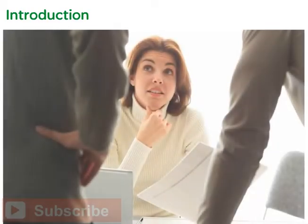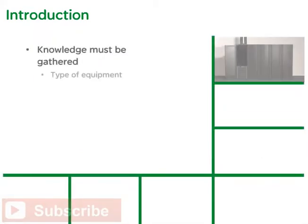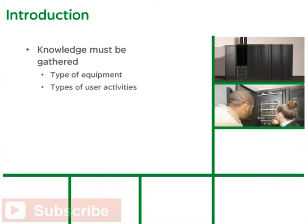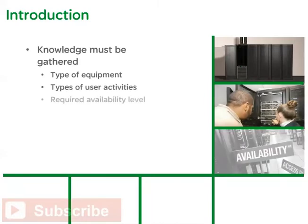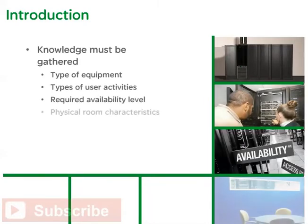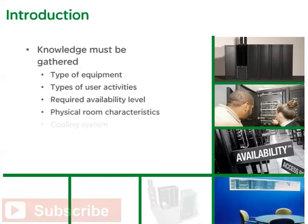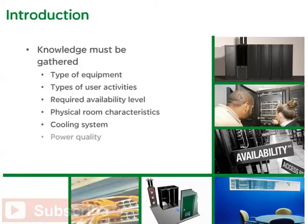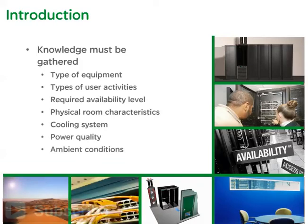Establishing a specification for a wiring closet or small computer room requires preparation. Knowledge must be gathered regarding the type of equipment that the room will house, the types of user activities that the room will support, the required availability level, the physical characteristics of the room, the cooling system of the building and of spaces adjacent to the room, the power quality available to the building and the room, and ambient conditions such as heat, humidity, dust, and risk of seismic activity.